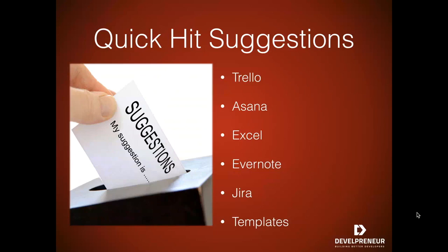And if you want to step it up a little bit, Jira is real nice. It has a lot of features that allow you to really blow it up into a nice enterprise solution, or you can keep it pretty simple and keep it down to essentially, here's my task, and assign it to yourself. The nice thing about Jira above some of those others is it has a lot of timestamps and reporting and things like that that go on behind the scenes, and it allows you to get a lot of the reporting and metrics out of this stuff without having to enter a lot of the data yourself. It just stamps stuff and keeps track of things for you a little bit.